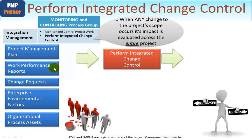The work performance reports are also an input, since they give analyzed information on the true status of the project and its forecast, so that this can be used as a bearing when considering any changes. Change requests are of course one of the main inputs here, since all changes have to pass through integrated change control before any decisions can be made about whether or not to implement them.